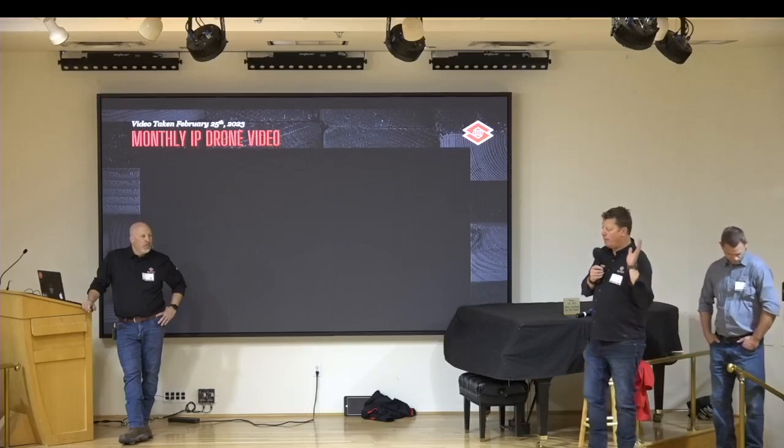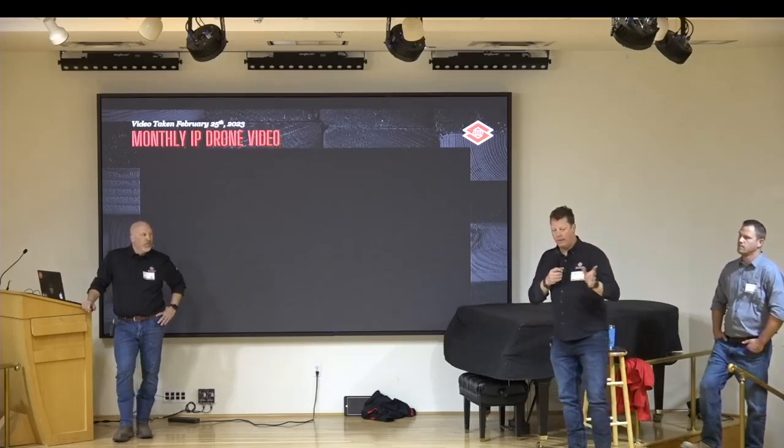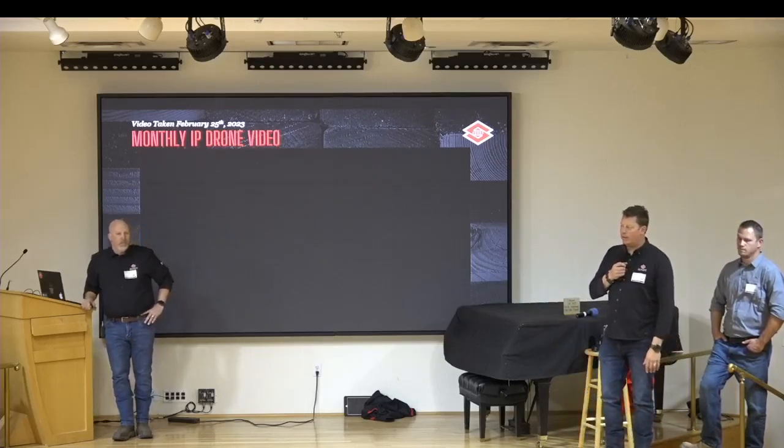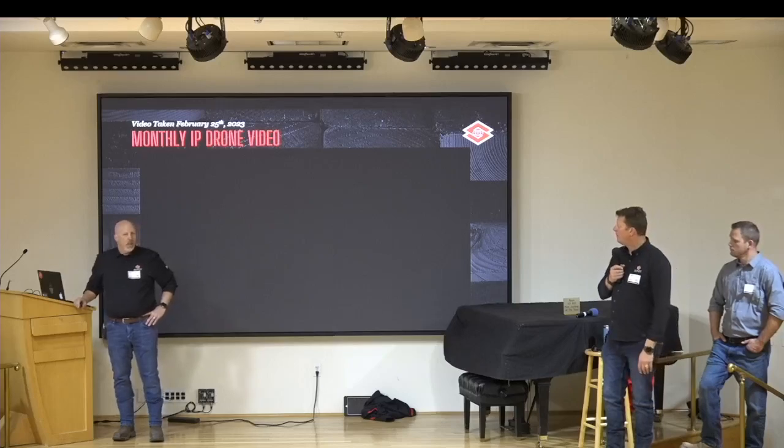So that was our plan, was to push the outside as hard as we could, the exterior skins and things like that, so that way most of the noises from screw guns and things of that sort is just kept to the inside. Good. Any questions on that?